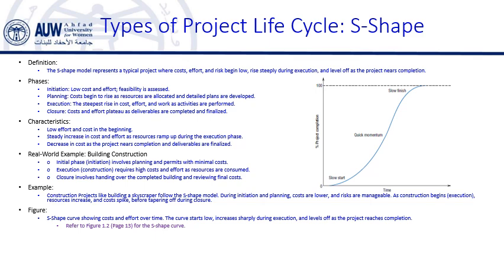During this phase, the project team is gathering information, identifying key stakeholders, and finalizing the concept and the project's objectives. The cost and effort are relatively low, but uncertainty is high because much of the detailed planning is still being finalized.